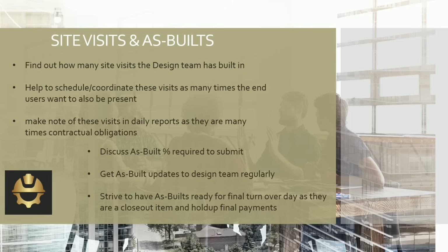And again, like Renee said, we've got as-built posting training as part of the course. We talk more about it in there, and I'm sure you guys have already gone through that by the time you get to this point. If not, go back and listen to our as-built posting, because it's really important. As-builts are tied to your final payment. You're meaning your company you're working for, whether it's a subcontractor or a general contractor. Your final payment is tied to the final deliverables, and as-built is one of them.